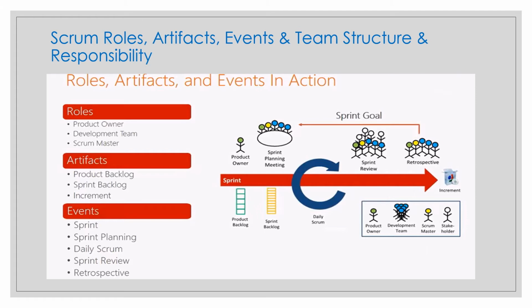No one else tells them how the product backlog items turn into an increment of value; they will only decide that. Okay, so the sprint goal, the product backlog items selected for the sprint, plus the plan for how to deliver them, together is referred to as the sprint backlog. Yes, correct. So what your sprint backlog contains is what the Scrum team decided: the sprint goal, the pulled product backlog items, and their plan to deliver them to the DoD, all together referred to as the sprint backlog.